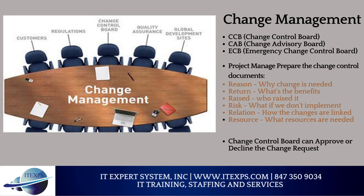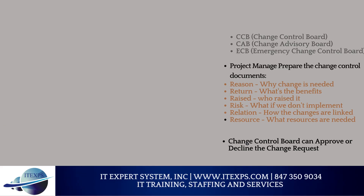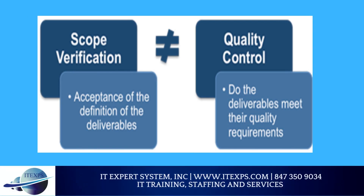Every project will have changes, although we do our best to avoid changes to the scope. Once the scope has been established, we would prefer to avoid any requests for changes; however, many times we have no choice but to manage those changes and accept them. So changes have to be well managed. Towards that, typically organizations will create a board that will provide approval after looking at a change from all its various angles to see what its impact might be. The function of the change management board is to ensure that all of the changes being requested are incorporated, but as that happens, the scope gets modified.